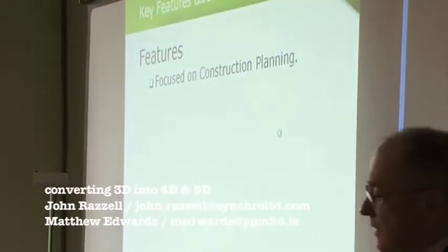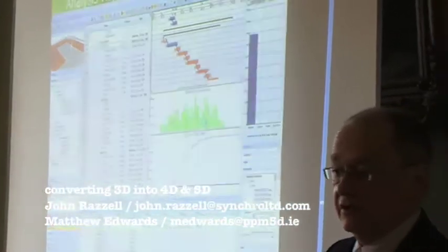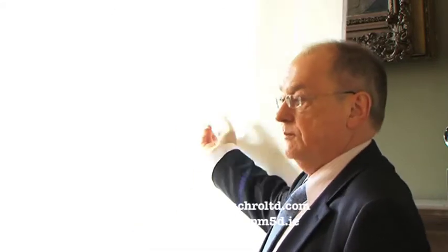we have user fields, which allow you to put your own information in, which allows you to create histograms of what that relates to. So we had one company who wanted it to do with scheduling within a site, and it meant they could only have certain things at any one time, so it worked on the size. They were able to do a graph that showed them exactly what the issue was about their laydown area. If it went above a certain line, they had to reschedule to make sure it kept it below. And that was using the user fields. The user fields means you can put any information you want in and then create feed information in chart format. And those charts can be exported out to Excel.